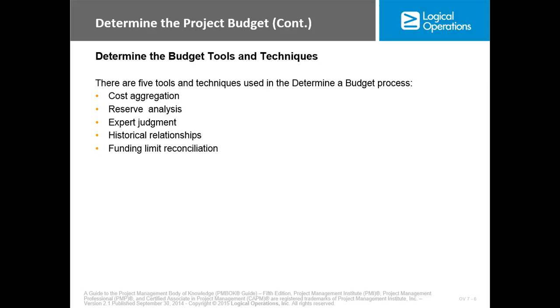Okay. But management reserve is actually kept to manage unknown unknowns, things that we did not anticipate. Okay, we use it to actually handle them. Now, expert judgment, historical information, past projects, then funding limit reconciliation.